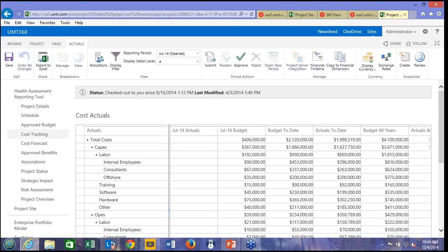There's a data exchange module that allows you to integrate with ERP systems to pull in actual costs dynamically. I'm not showing that here, but you can sync the actual costs, so they'll already be shown here as the committed costs before they add their accruals. Three ways to enter actual costs: by hand, which I don't recommend, through the ERP integration module, which I do highly recommend, or even through the schedule itself.